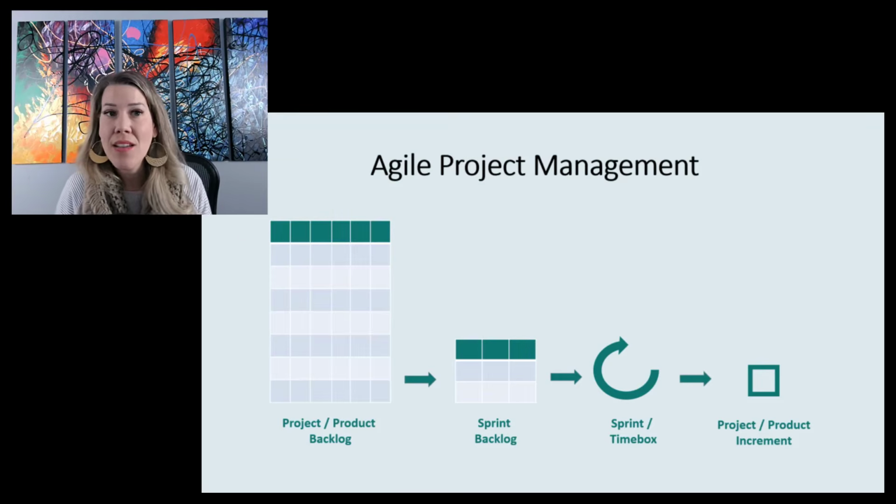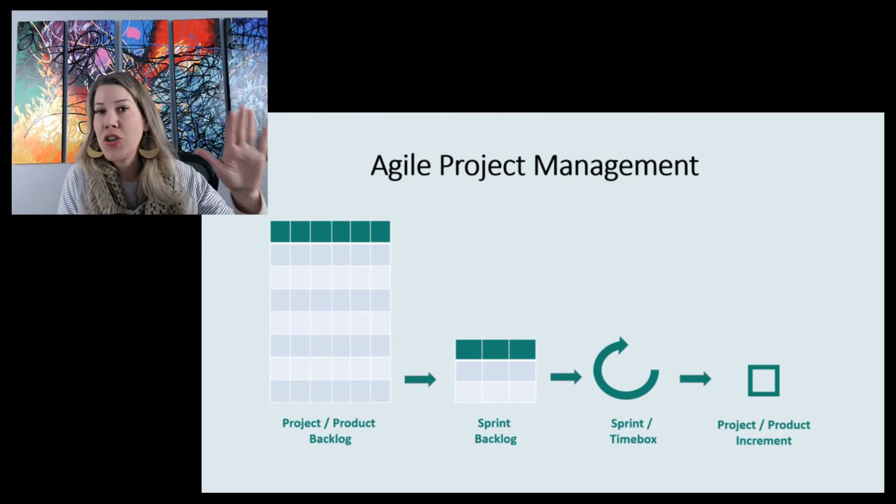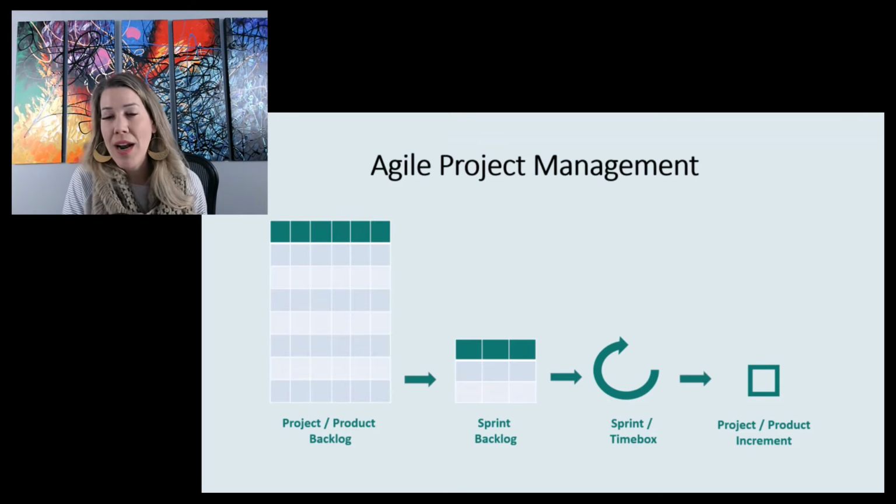Sometimes when we showcase our increment to the customer, they may say, that's not exactly what I expected, or, oh, maybe we didn't think about this. Let's add some additional requirements. So if you add some additional requirements to your backlog, then you need to reprioritize. And that way you're always pulling the highest priority items or the ones that are going to add the most value.